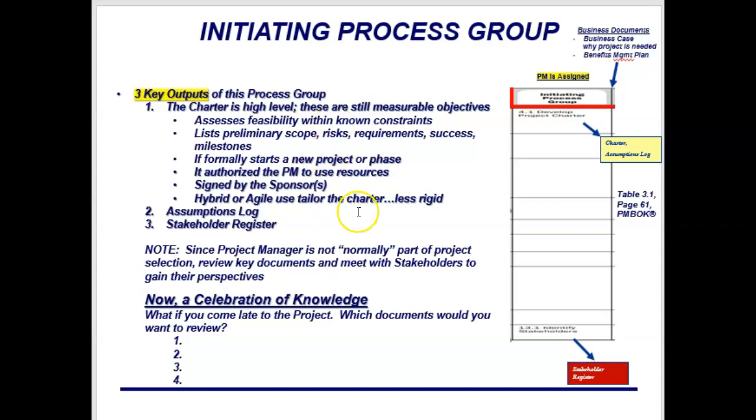And this is on the right, a summary of page 25, the picture itself. These are the processes, and I note the output. Notice the output is in brown because that process 4.1 is what you do as the project manager. You, with the team that you've developed so far, will create the charter and the assumptions log. And then your stakeholder SMEs will, through this process, develop your stakeholder register with you.